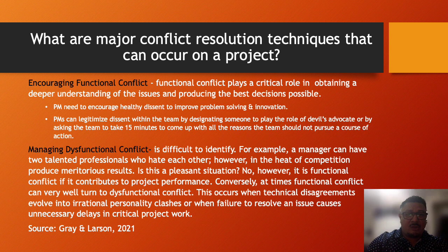Now, functional conflict plays a critical role in obtaining a deeper understanding of the issues and producing the best decisions possible. As project managers, we need to encourage healthy dissent to improve problem solving and innovation. As well, we can legitimize dissent within the team by designating someone to play the role of devil's advocate or by asking the team to take 15 minutes to come up with all the reasons the team should not pursue